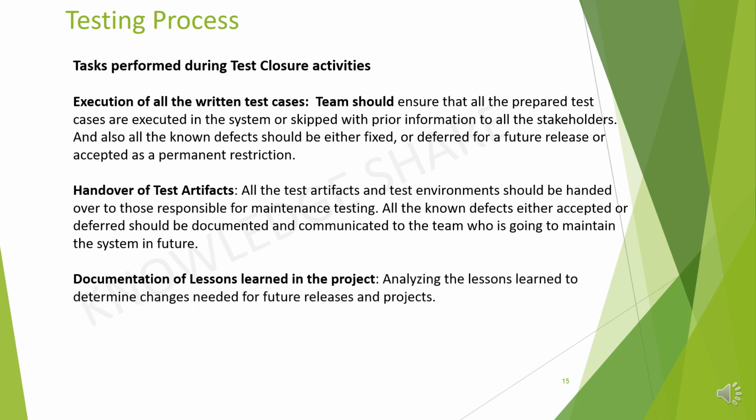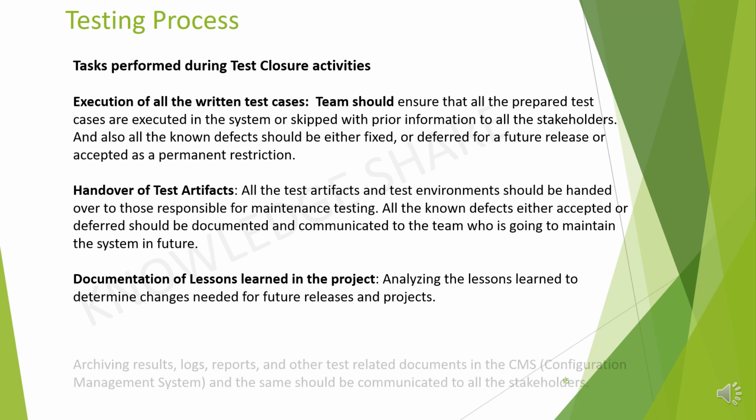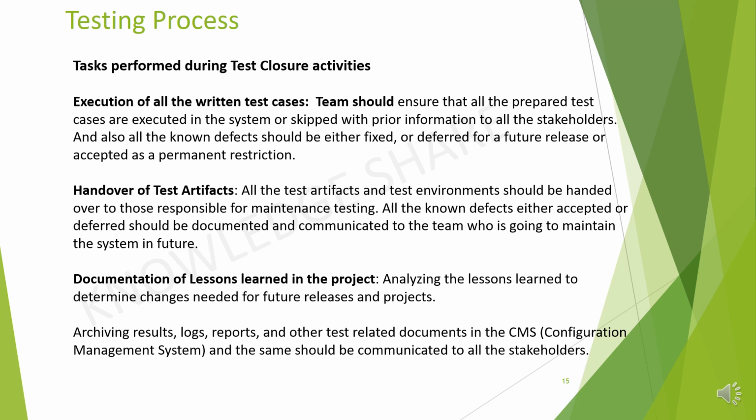3. Documentation of lessons learned in the project. Analyzing the lessons learned to determine changes needed for future releases and projects. And last, archiving results, logs, reports and other related documents in the CMS, that is Configuration Management System, and the same should be communicated to all the stakeholders.